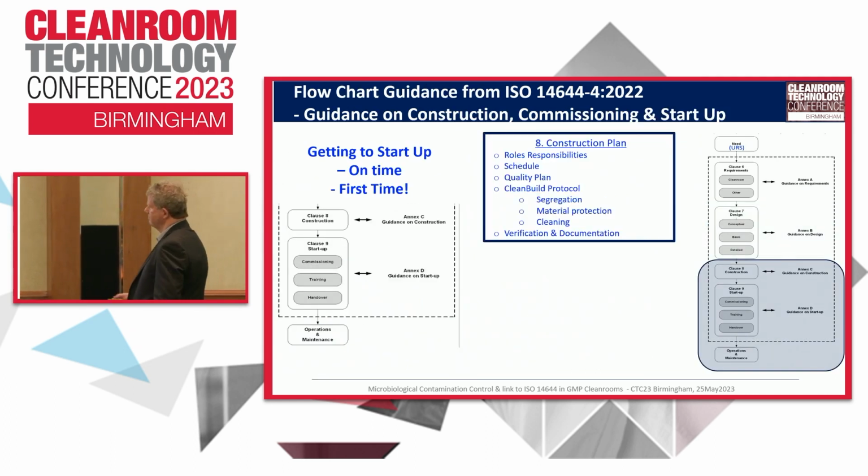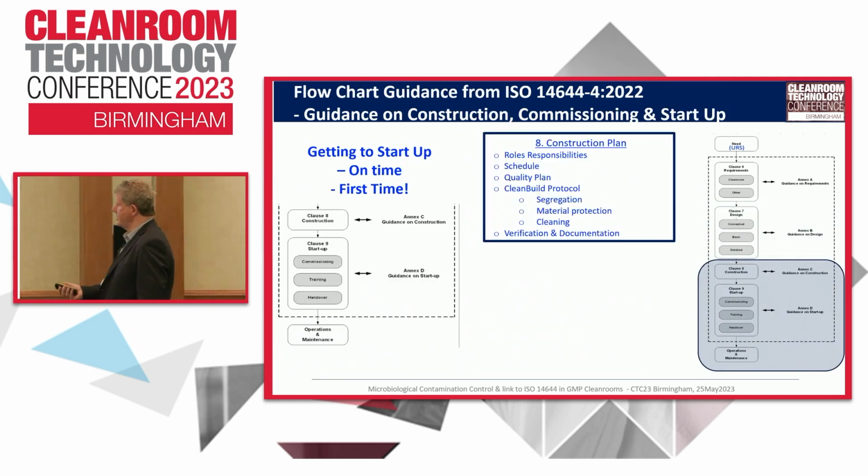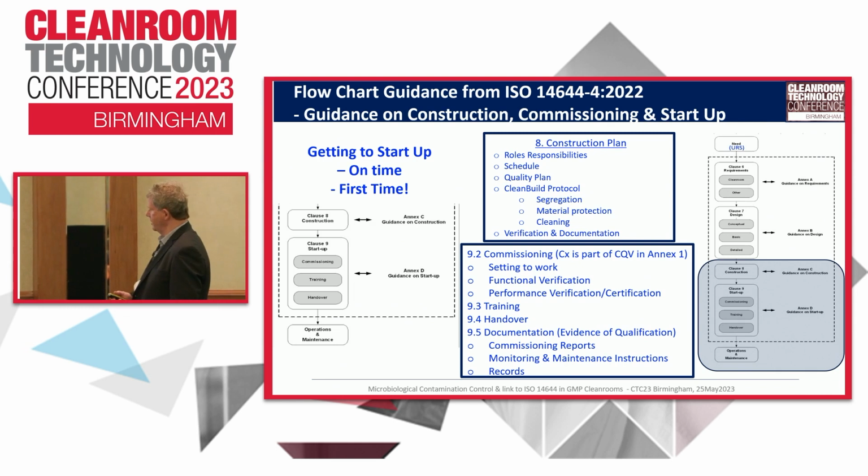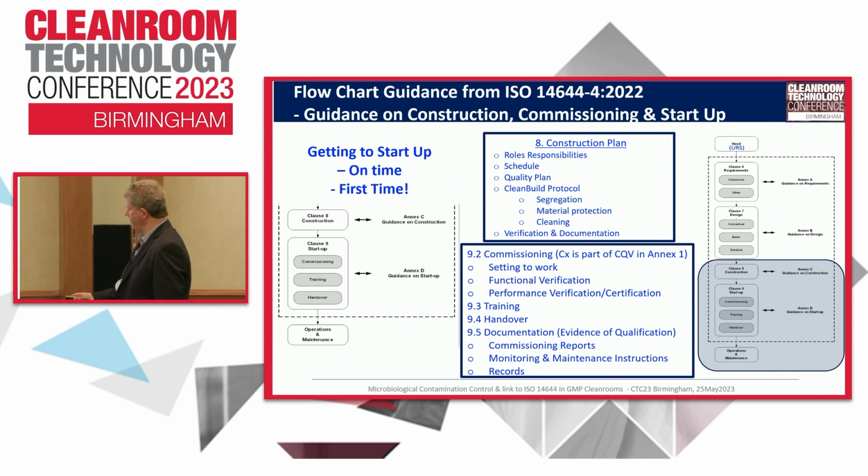And then, of course, commissioning, getting to start up on time, first time. If you do not commission your facility, you'll spend 6 months messing around with it. So there's the construction plan and your commissioning. Okay, I call it setting to work. And finally, you need your certification coming out of that.